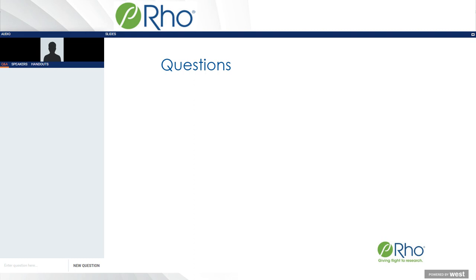All of these things that we've talked about throughout the presentation are all things that we ask about during the qualification process. Something else that I find very helpful is if you're able to provide a synopsis to the site and you put it in front of them and ask them whether they see any operational concerns, that can help you determine their level of experience by listening to how they would operationalize that protocol. If they can't quite answer that question of how do you operationalize that protocol, they may not have as much experience as they say they do. So just something to consider. It absolutely isn't the only thing I would weigh in on for evaluating the site, but just one piece to try and vet how much experience they actually have if you don't have that historical relationship with them.